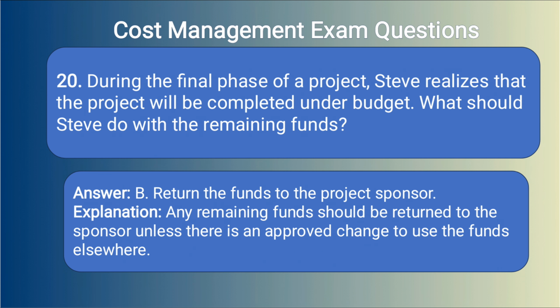Answer: B. Return the funds to the project sponsor. Explanation: Any remaining funds should be returned to the sponsor unless there is an approved change to use the funds elsewhere.